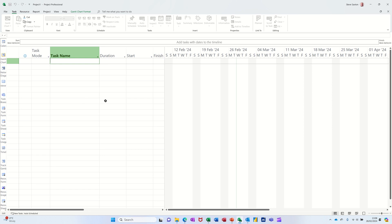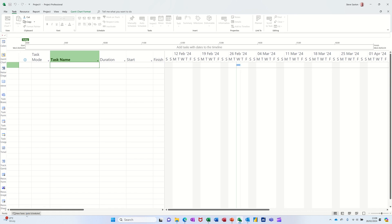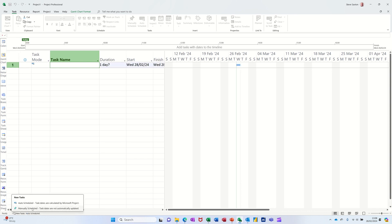On the screen I've got a blank file open. I've got my default setting down the bottom here changed to auto-scheduled, so that when I type a task it will give me this sort of information there and a little icon on this Gantt chart view on the right hand side.